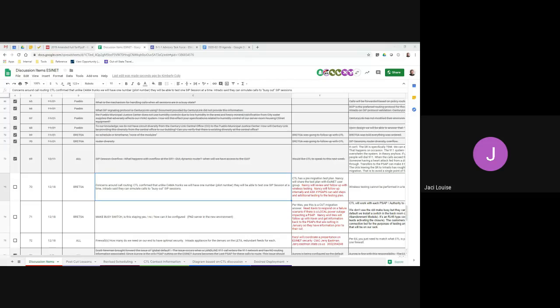It's changed again since then, because when they added Westco and then moved Westco, it would behoove CenturyLink to put out the new star code list and make sure everything's updated on that list. And that should also be on our checklist to make sure PSAPs are ready for the transfer. Right, and that's why I was bringing it up here. It's something we'll want to validate prior to transfer, that those have been updated and there are none hanging out there.